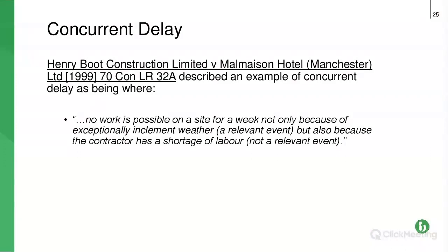Concurrent delay, I'm just going to skip through this. Concurrent delay is basically where you have two delays at the same time. One is something that the employer is responsible for, so a variation, really severe weather, storm Anwer, what else? Delay by statutory undertakers.